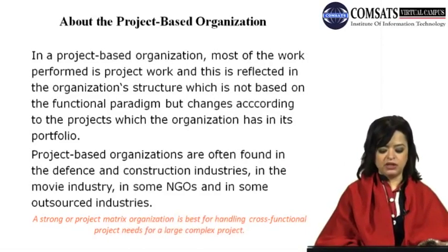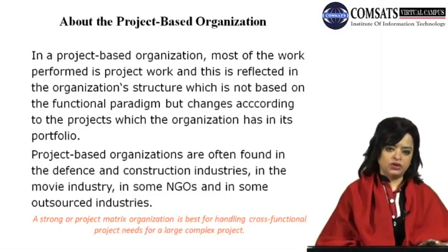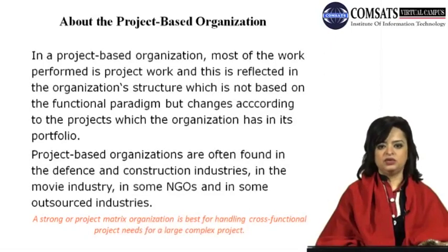A strong or project matrix organization is best for handling cross-functional project needs for a large and complex project. The larger the project is, the more complex the project is, you need dedicated resources working on it without any conflicting orders given by other managers.